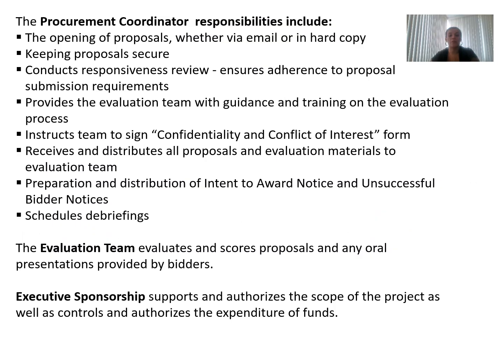Some of the procurement coordinator responsibilities include the opening of proposals, whether via email or in hard copy, keeping proposals secure, conducting a responsive review, ensuring adherence to proposal submission requirements, providing the evaluation team with guidance and training on the evaluation process, and instructing the team to sign the confidentiality and conflict of interest agreement. That should be a document that is also part of the policies of the company. Also, receiving and distributing all proposals and evaluation materials to the evaluation team, preparing and distributing the intent to award notice and the successful bidder notices, and scheduling debriefings.